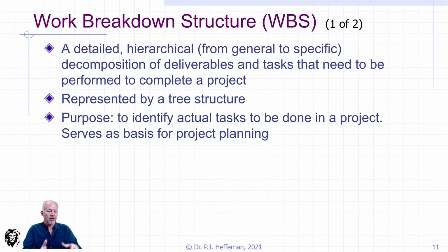And I think in terms of construction, well, if you're going to ultimately deliver on a new building, you probably have to do excavation work and land work. You probably have to be working with the developer to make sure the various utilities and everything are delivered to the site. You probably have foundational work. You have structural work, and then you have exterior cladding work. Now you're into the more details of interior work and utilities within that. It doesn't matter what the project is. The work breakdown structure is this hierarchical breakdown of successively smaller tasks.